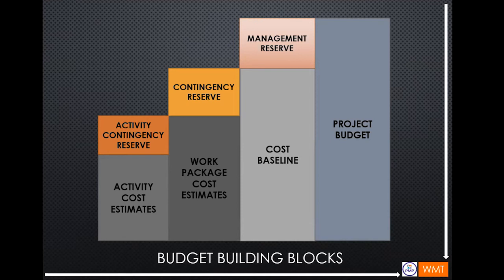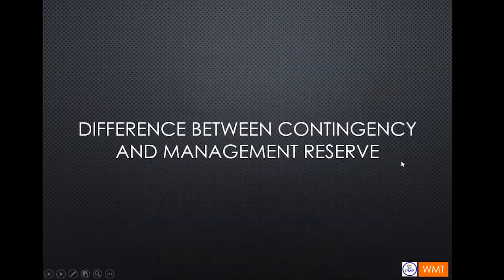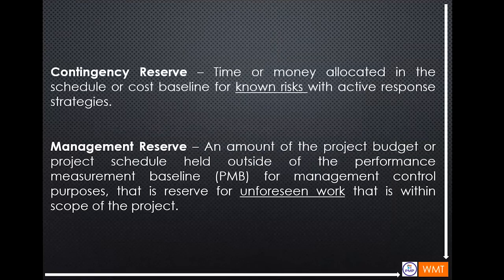So the project manager can only control the contingency reserve. What is the difference between contingency and management reserve? Contingency reserve is time or money allocated in the schedule or cost baseline for known risk with active response strategies.